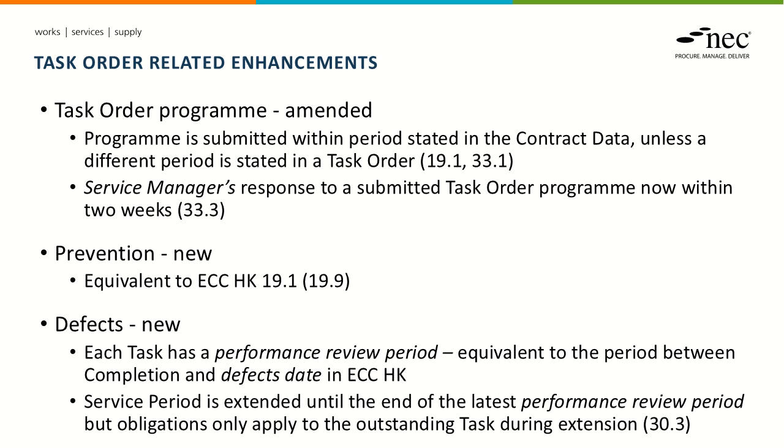Depending on the timing of when a task is instructed and hence when the task starts and when it completes, if the performance review period for a particular task runs over the end of the service period, then we have a provision that allows the service period to be extended to the end of that performance review period. But during that extended period, we can't issue any further tasks or instruct any other works or services.